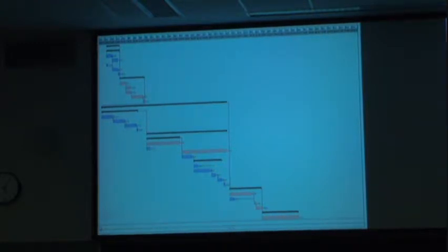This is what a Gantt chart looks like if done properly. So you can see there are tasks that are stacked on top of each other. Those tasks are being done in parallel. Tasks which are stacked left to right are in sequence. And I don't really have the detail here. I was going to open this up for you, but usually you can lay these out in project management software, something like Microsoft Project. I did this one in ProjectLibre, which is an open source example of the same thing. It was pretty much a Microsoft Project copy, but it's open source. And you can build these timelines out in detail, and it will give you an indication of what the critical path is.